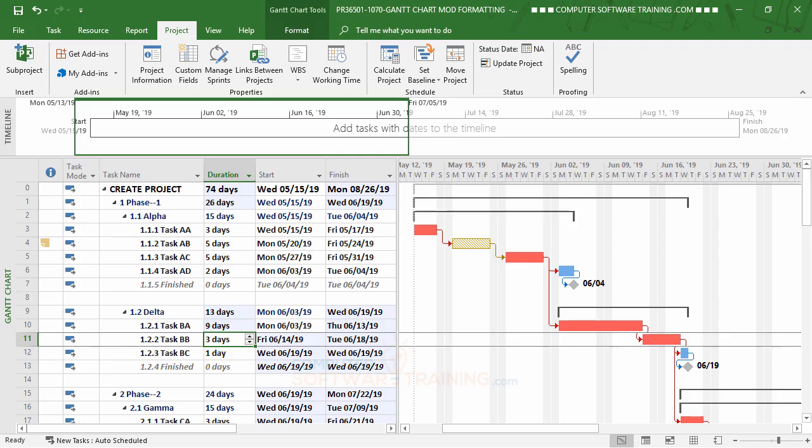So how are you going to work that out? Well, the alternative to what we've been doing here is to go in there and either remove certain tasks that will shorten it up, so we can bring it closer to the 20th, or we can introduce lead time where we're overlapping. All right, do that kind of thing. So what you can do is kind of experiment.